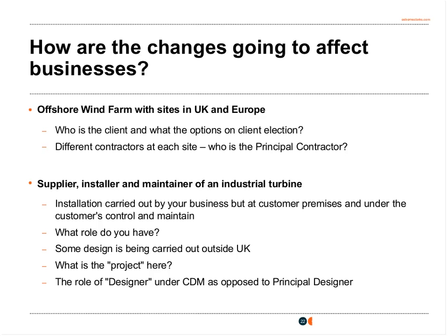Assuming that the installation of the turbine is a one-off installation with a continuing maintenance contract, it is possible that the CDM project will be the whole period from the first point at which the customer starts looking at options for turbine installation all the way through to the end of the turbine's life and its maintenance.